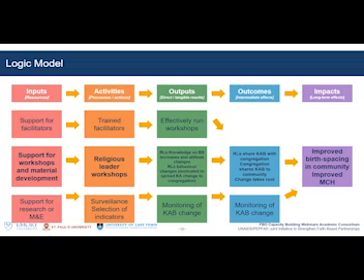So, for instance, in the curriculum work in Nigeria, we drew from existing curriculum materials that had already been implemented and evaluated in 6 different countries and shown to produce knowledge and attitude changes. So there are ways that your theory of change and the logic embedded in the model can be strengthened. The likelihood of producing those results can be strengthened when you draw on intervention research that has been shown to make the difference that you're claiming to make.